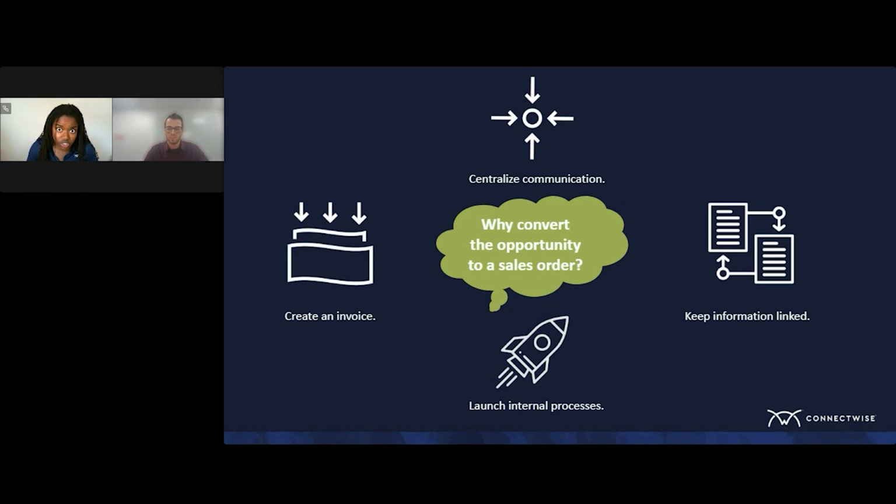And the reason why it's so important to generate purchasing demand and invoices in that sales order, in that sales handoff, is because, for example, you need to procure those items and collect payment from your customer before you actually start to schedule services. You don't want to jump ahead of yourself and actually schedule services to deliver, in our business case, which would be security, hardware, equipment, and recurring services.